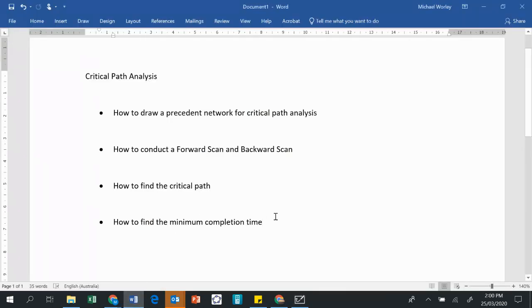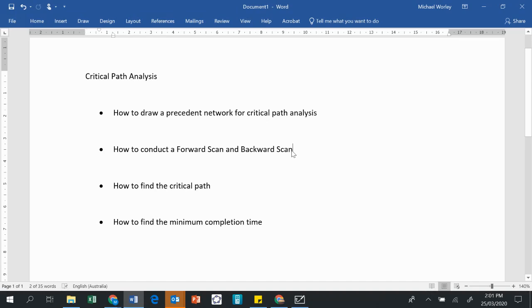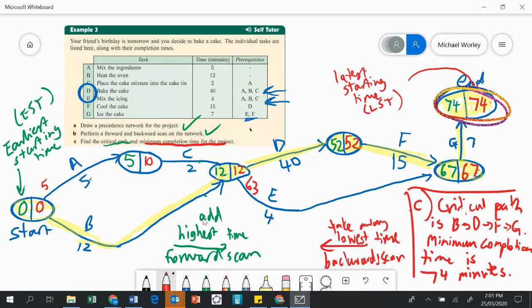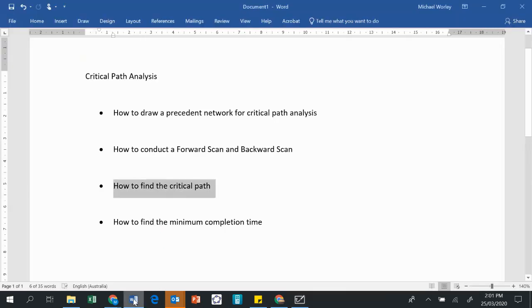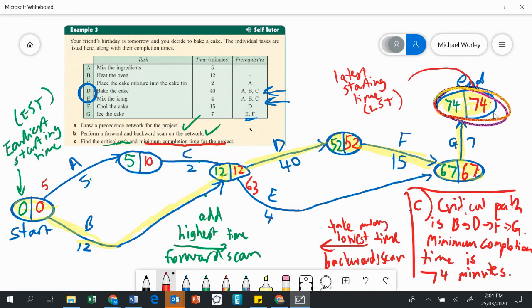Let's check what we wanted to learn. Can you draw a precedence network? We've done that. Can you conduct a forward scan and backward scan? The forward scan goes on the left hand side of the bubble, and the backward scan goes on the right hand side. The critical path is found by looking where the bubbles are equal — where the earliest starting time equals the latest starting time. The minimum completion time is found by looking at the very last bubble at the very end.